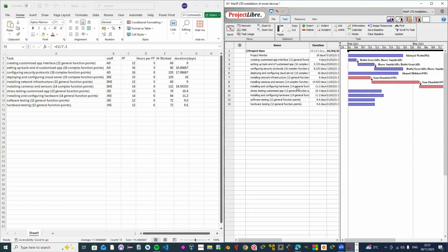All right. So we have those. And then after we've done that, it says stress testing customized app. This has to be done after the customized app has been completed. So it's a stress testing of customized app.